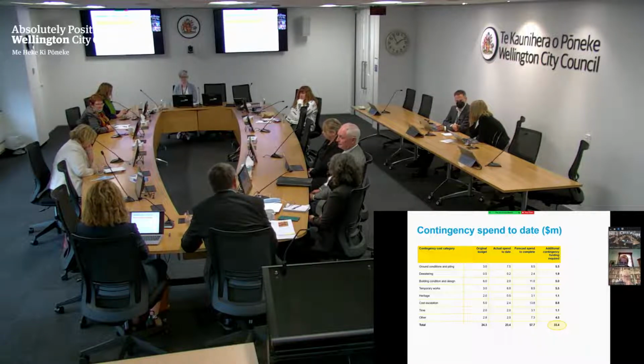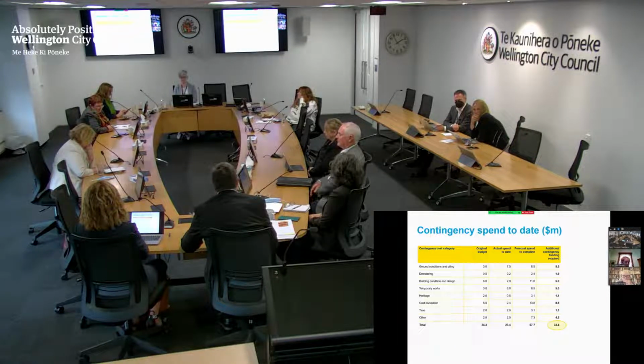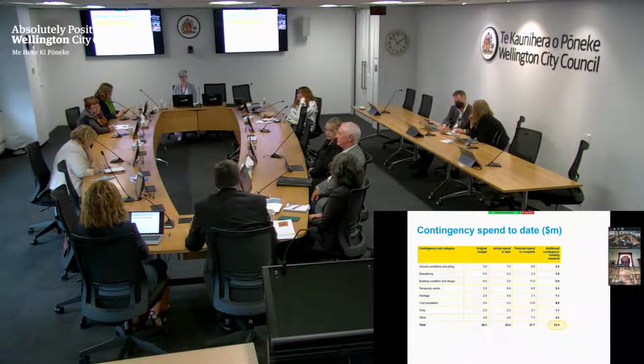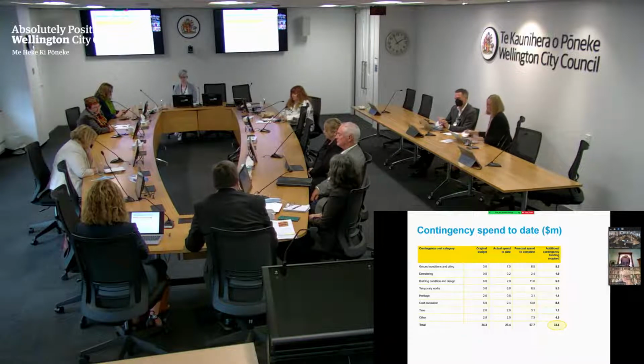the settlement of the first 2 years of cost escalation. So that's your 3 or 4%, which are closer to the norm we were expecting. The ongoing ones are your 6 and 7 and 8% cost escalations. So that impact is really to come and hit us yet, and we're seeing it in our forecast, but not in our actual costs at the moment.